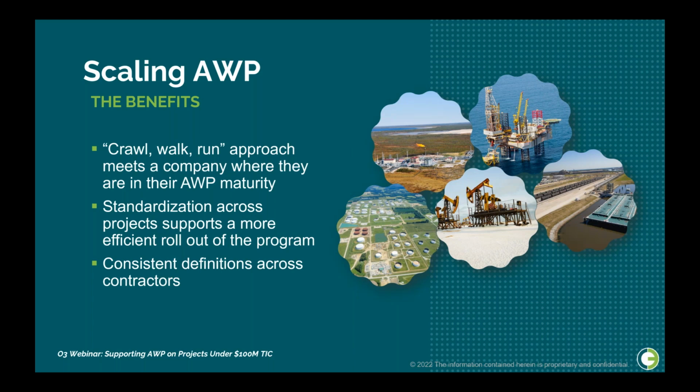In large cap greenfield projects, you have to introduce all of the change at once and then lock in your project execution approach for the entire duration of the project. With small cap, you can follow a crawl, walk, run approach over the course of several projects while limiting the change being introduced on any one project. This means you don't have to tackle everything right away. You can follow the below approach, for example.